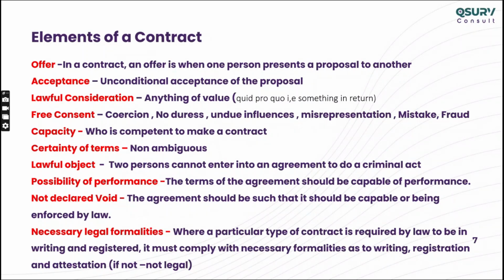When you draft a contract, it should say construction, supply, installation, testing, commissioning of the villa or building known by this name under the approved plan attached in Appendix A. Now it's very specific. If you write only construction of the building, that's not specific. You are specifying the building, building number, permit number, approved plan, and that becomes a specific offer. So it shouldn't be ambiguous.